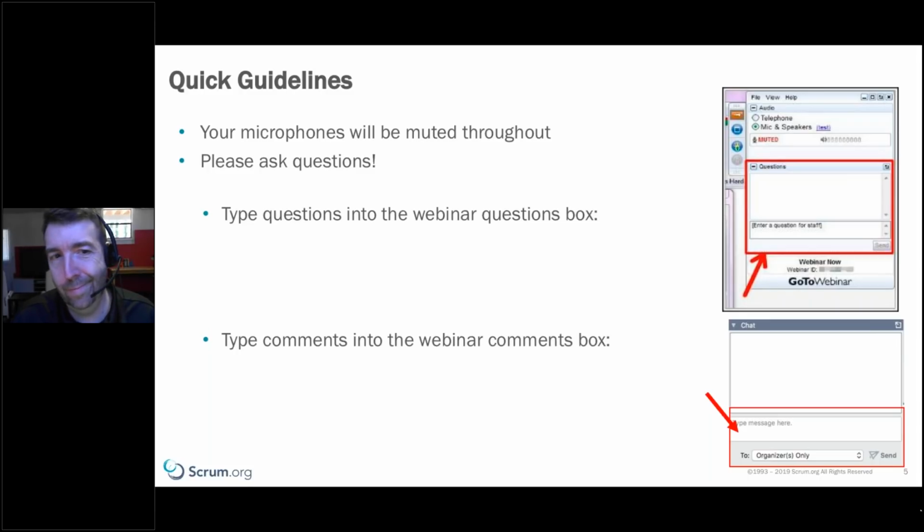There's a phrase that's used in a good book that I like about retrospectives, and it says to avoid the do nothing retrospective, where people talk and vent, but they don't come out of that with a plan. And so that just kills morale and esprit de corps, because you feel like you're wasting your time. So even if it's small, I suggest coming up with a specific improvement and a plan for it, and measure that and record it and keep track of these improvements, so people can see the improvements over time.